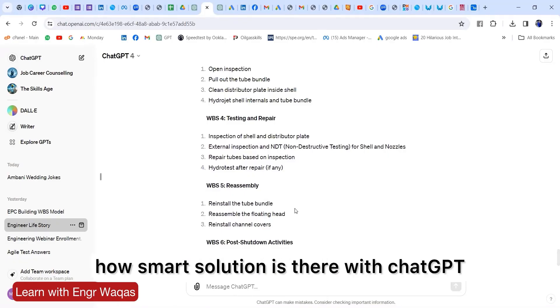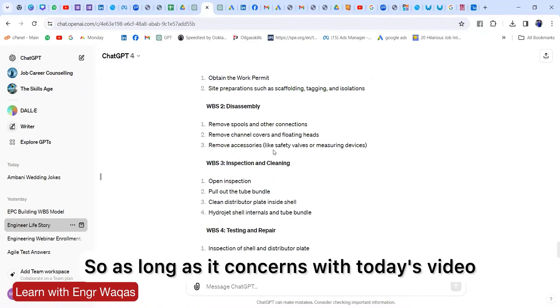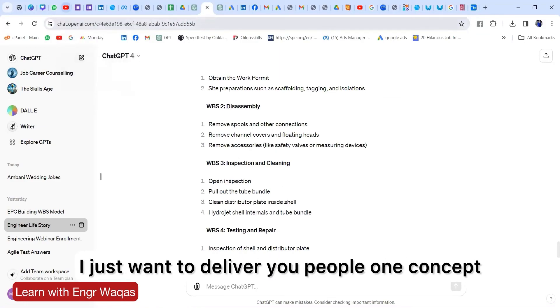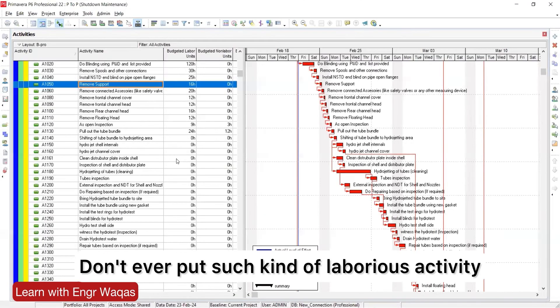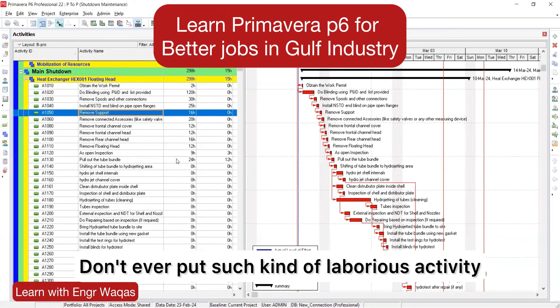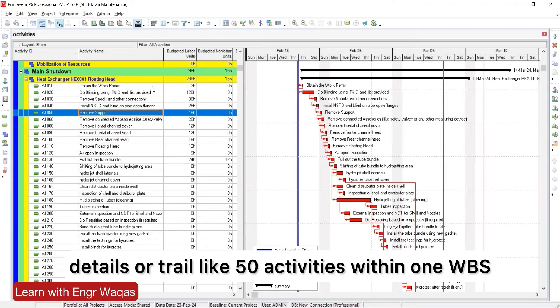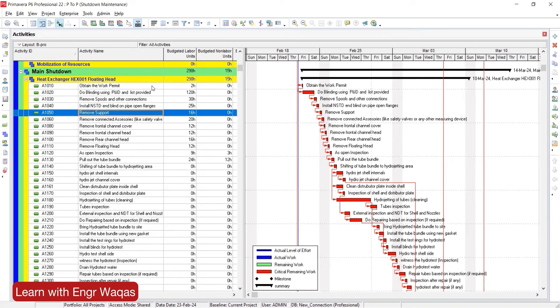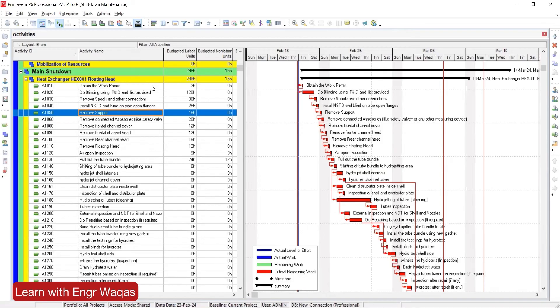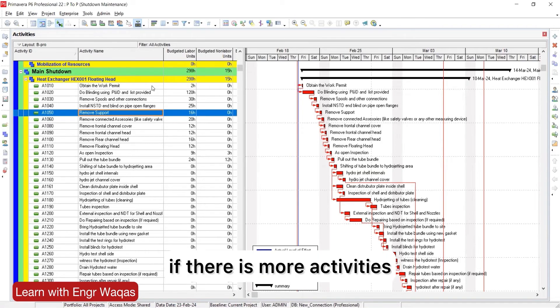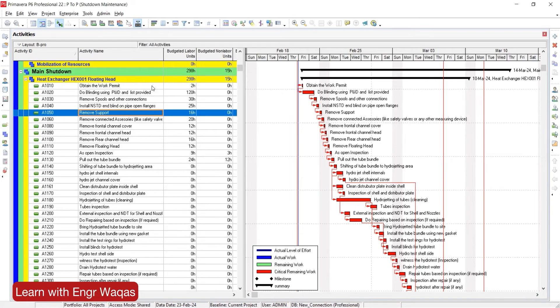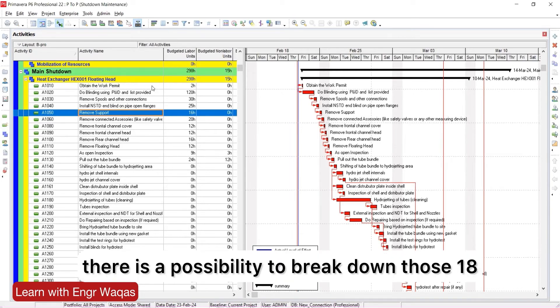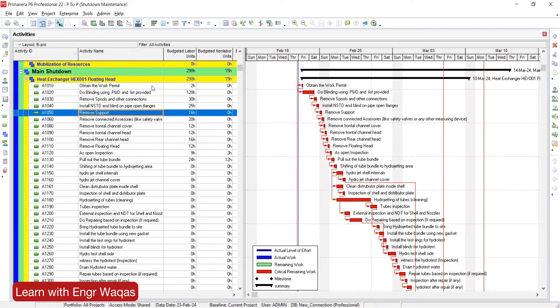As long as it concerns today's video, I just want to deliver you one concept: don't ever put such kind of laborious activity details like 50 activities within one WBS. There is a standard. You should put maximum 10 to 12 activities within one WBS. If there are more activities, like 18 activities, there is a possibility to break down those 18 activities into two WBS. Just think beyond the limit.